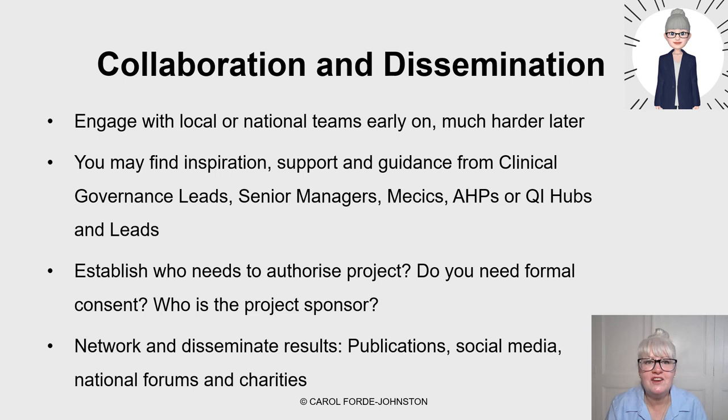So you need to have, for a successful project, engagement with local and national teams early on. I know people that have started or gone in and tried to look at doing a project halfway down the line, and they realise they actually can't do it unless they have authorisation. And it's much harder to get that later. And it can annoy people when you go back later as to why they weren't involved from the beginning. So a key tip for me is to find out all the key people that should be involved. You might find inspiration and support and guidance from clinical governance leads, service managers, medics, sorry, there's a spelling mistake there, AHPs or quality improvement hubs and leads.